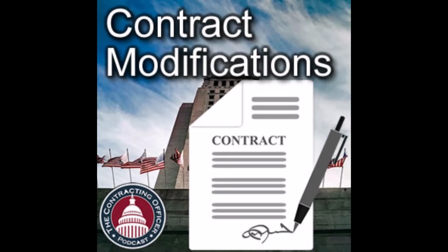From the government side, if you're working a very complex change that's going to be a complex modification to the contract, treat it like a new acquisition. You need clear documentation of the requirements, what's changing, which means updated statements of work, potentially new deliverables, updates to the schedule if there's a master schedule for the program. Think about it like this is fresh. You're going to need to document the changes to all those little pieces of the contract. It's not just about hours or materials.